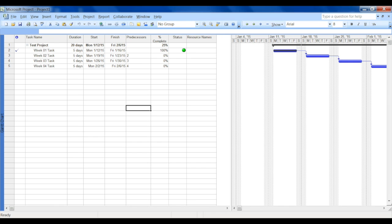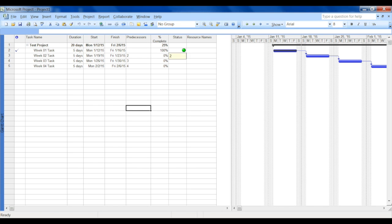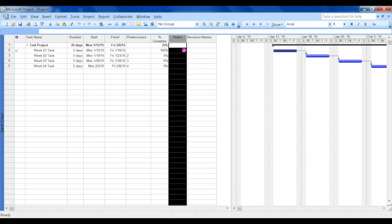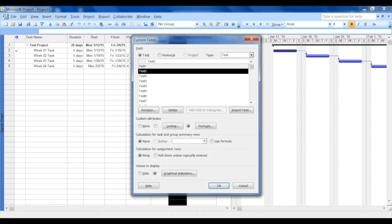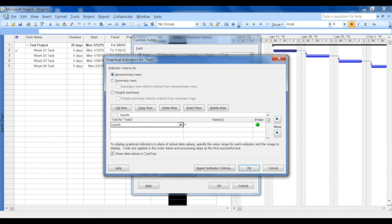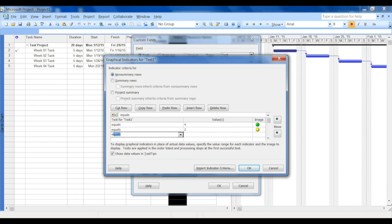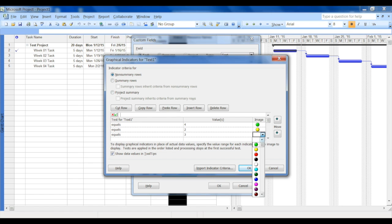Just by doing that, you'll notice that the 100%, number four, became a green. You can still point your mouse at the status column and you will see the numbers that IF condition is returning. In this case it's two because the task is due within two weeks and it's less than 80% complete. So let's mark those graphical indicators: anything which is two is yellow, that means it needs to be looked up or it needs attention. Let's say anything which is three is red.